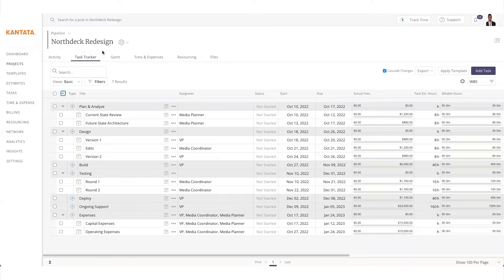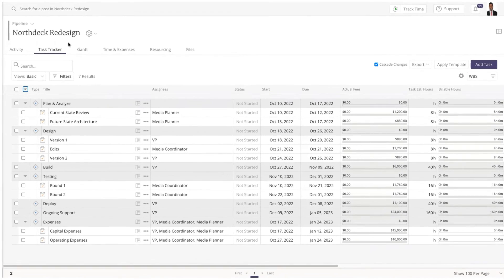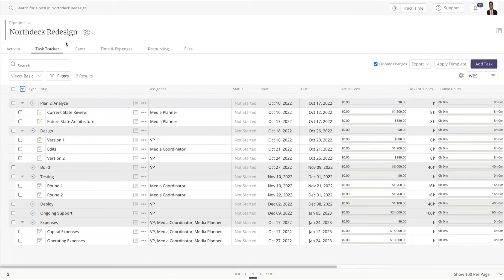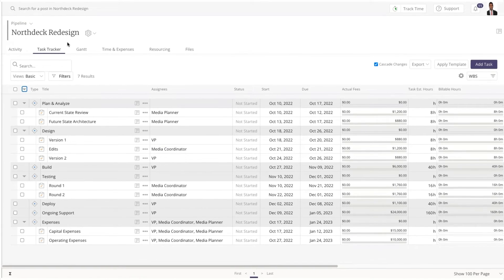We can also take these estimated hours and financial budgets and use them as a baseline to compare our estimates to actuals as we get to the actual delivery of the project. This helps refine future projects with more accurate planning.